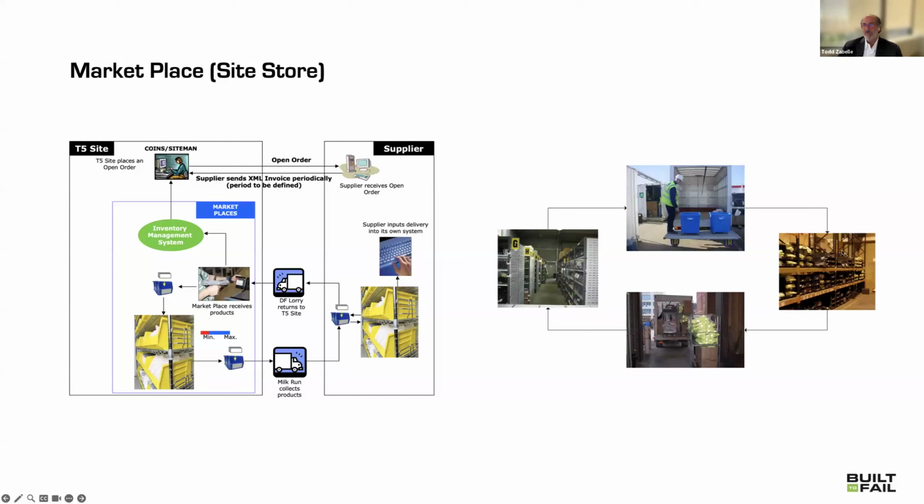A better way to understand this is there was stuff at the site, okay, that was stored in bins. The driver would literally go on a milk run around town, and town could have been a 100-mile radius or whatever, pick stuff up. And the rule for the supplier was when we send a bin in, it's empty, fill it and let it sit. So there was 2 bins at the site, maybe 2 bins at the supplier, maybe 2, depending on what the situation is, in transit, or 1, and just went around in a milk run.